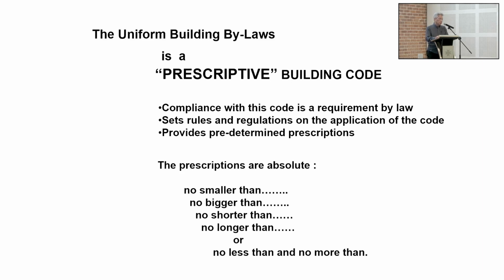I think 1st of April this year, 2024. As far as Bomba is concerned, when you submit plans, irrespective of which state you're in, they'll be looking at UBBL 2021. So UBBL 2021 is now officially gazetted; gazetted is not the right word to use, but it's officially being implemented.